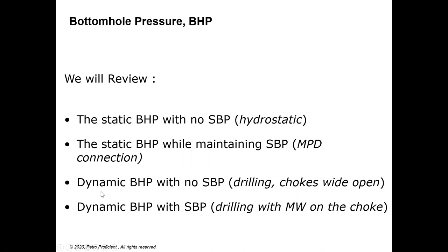Now there are dynamic scenarios where you have bottom well pressure, but your choke is wide open, you're drilling, and there is no surface back pressure. Also, you have scenarios where you're drilling with mud weight on the choke, so you actually have surface back pressure while you're drilling. So there are many scenarios in an MPD, and you need to consider all these things in your planning process. Therefore, it generally takes 2 to 3 weeks for an engineer to go through all the scenarios.